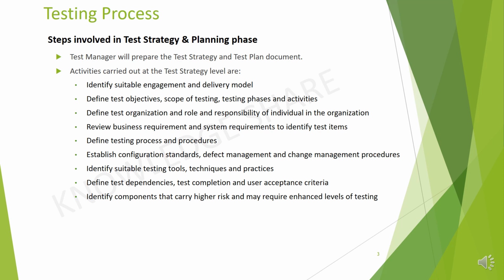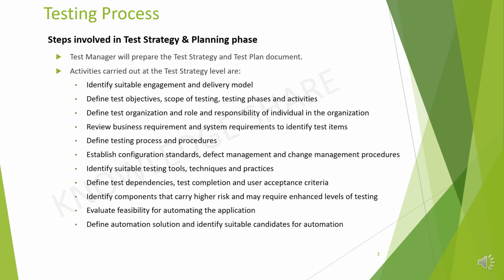Then, identify components that carry higher risk and may require enhanced level of testing. Then, evaluate feasibility for automating the application and define automation solution and identify suitable candidates for automation.